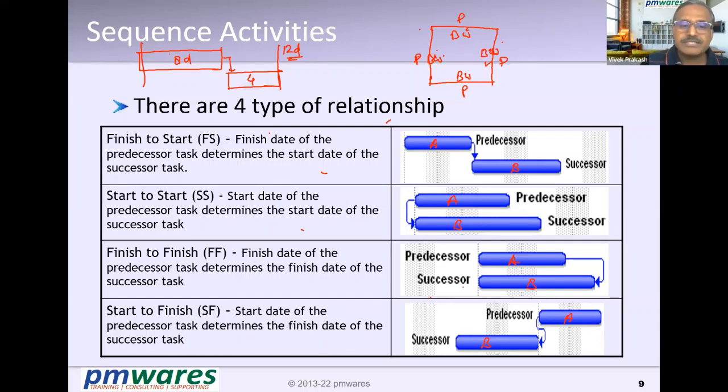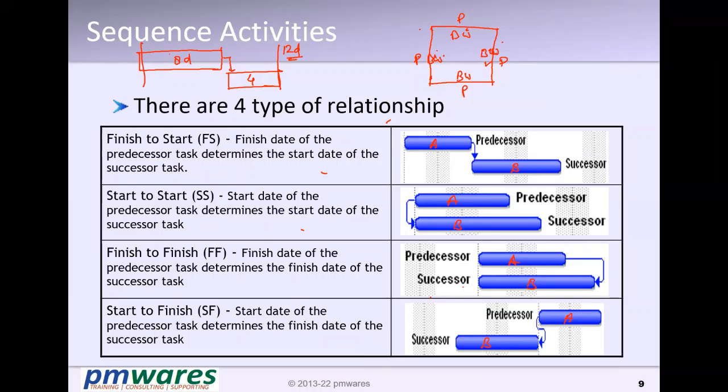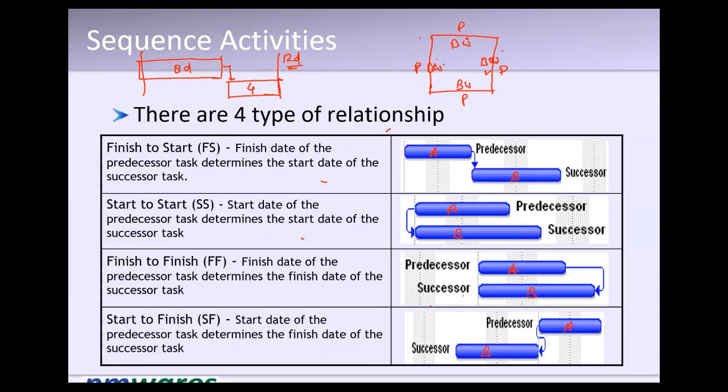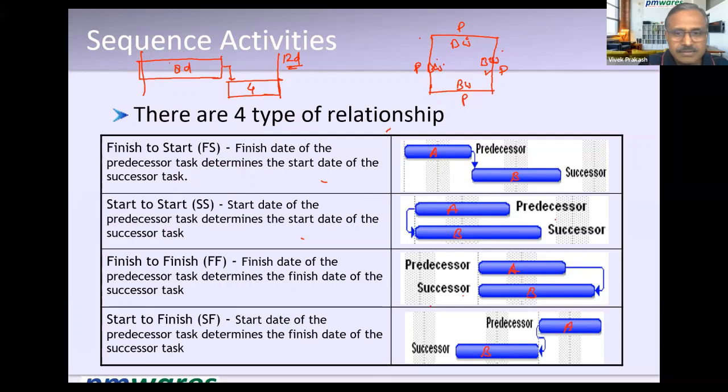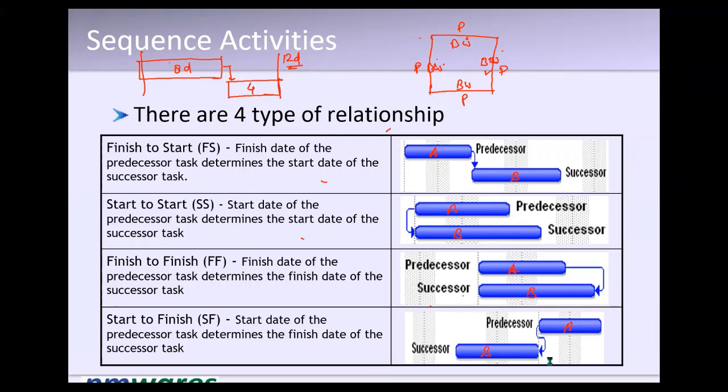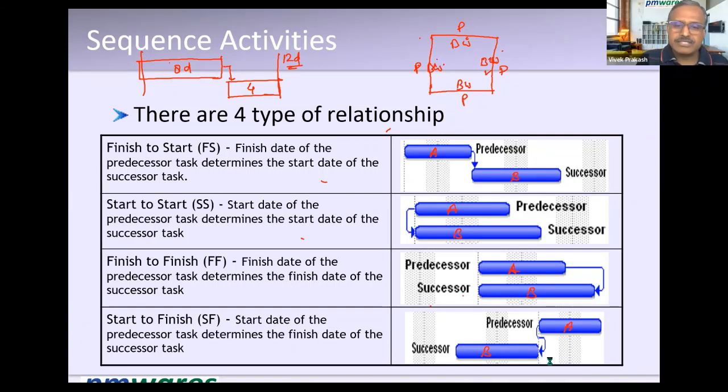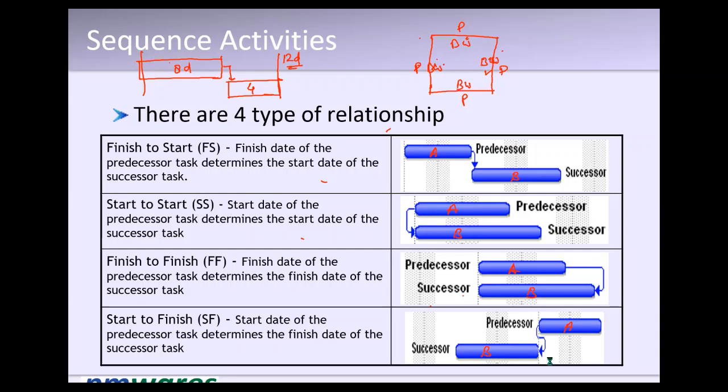So what will I do in this case? Brickwork of the first wall. Then we can start brickwork of the other walls, and at the same time we can plaster the first wall. So as soon as the first wall's brickwork is complete, I can start the plaster.